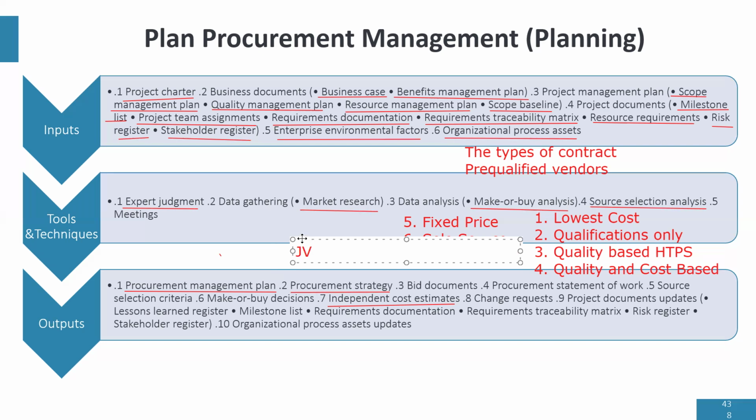Ideally, I pay a contractor to do work for me. But if I choose to partner with the contractor, who uses resources, I also do my part and then we split the profit. So it's a procurement strategy so that instead of paying the vendor, you partner with the vendor and you share the profit. And of course, in Nigeria, NNPC does that with all the major IOCs, right? Joint venture is a procurement strategy.